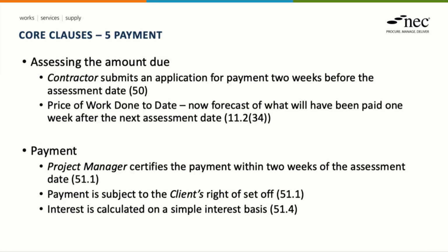In terms of payment, the change here is the timing of when the application for payment is submitted by the contractor, and is now 2 weeks before the assessment date. And in terms of what we're assessing, and more specifically the price of work done to date, and this applies to the cost-based contracts, it'll be a forecast of what will have been paid 1 week after the next assessment date.